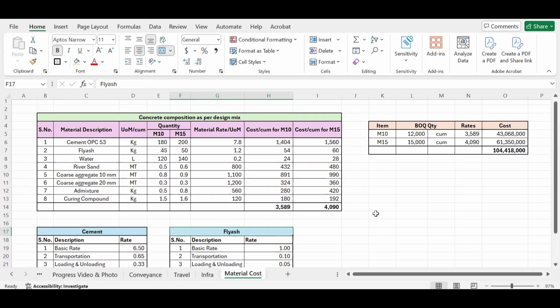You can do a similar exercise for other materials also, like if you want to do it for tiles. Suppose you'll be getting the material from your subcontractor for tiles. You will have to supply some sand, some cement, some water to prepare the mortar, and all the materials that are associated with tiling works, you'll have to consider them. In a similar fashion, you can repeat the exercise for other components also, like brickwork, or let us say reinforcement, or your shuttering. But one important thing is that you should not miss out any particular item for producing the unit quantity of that particular material.